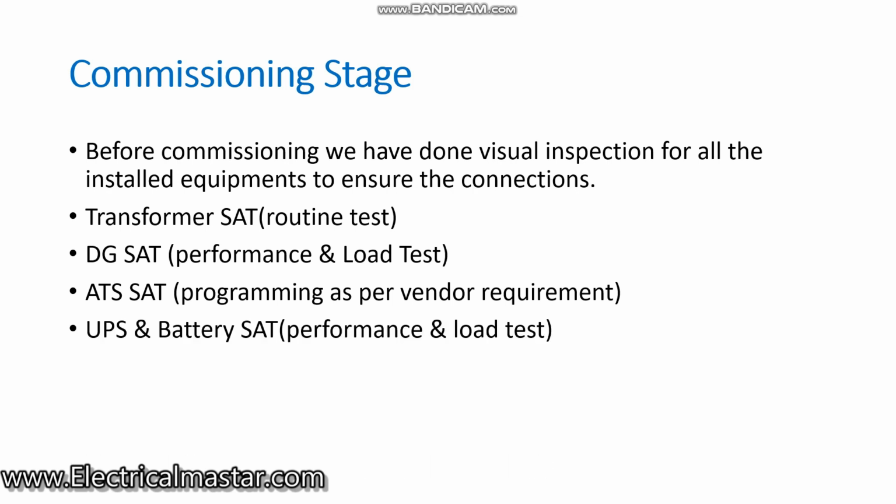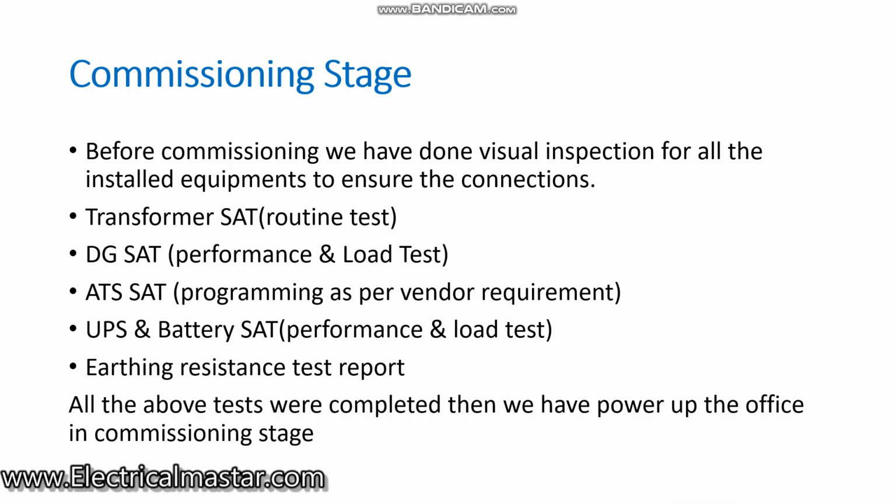And fourth, UPS and battery SAT. We have done the UPS functional and alarm tests, and also the load test of the battery, and the charge and discharge tests. And then next is the earthing resistance test report. I submitted this earth test report to the concerned team before going to commission the site. So these are the SATs you have to follow before starting the commissioning.